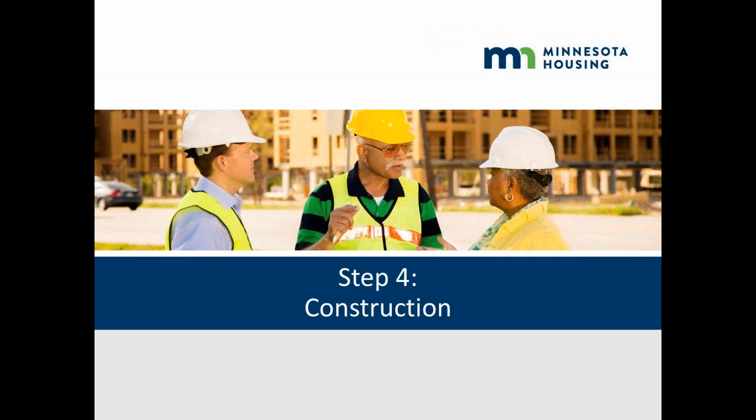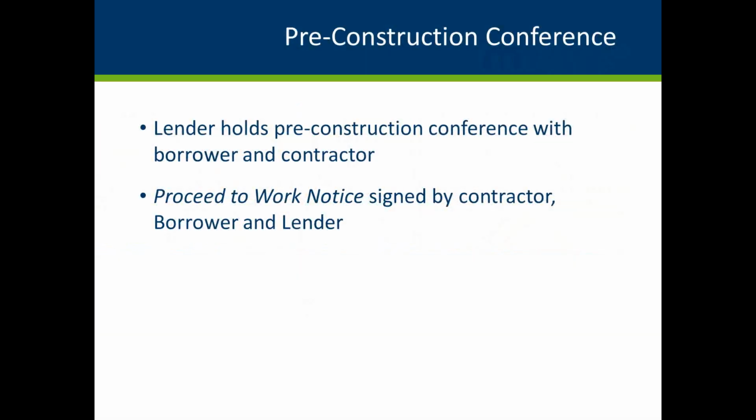Step 4, construction. Once the loan is closed, you will hold a pre-construction conference with the borrower and the contractor. In this meeting, you will discuss the borrower's responsibility, the contractor's obligations, the work schedule, as well as the process for resolving disputes, completing the project, and payments to the contractor.